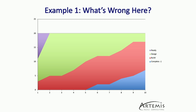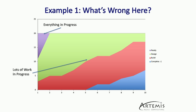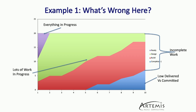Let's take an example of a cumulative flow diagram for a team that is not doing well. Everything went into progress very quickly — we have 20 items, and by day two, none of those items were still marked as ready. Everything was at some level of being worked on. By day five, we still have all 20 items at some state of being in progress. We have a lot of incomplete work at the end of the sprint — almost all of those items weren't completed. We end up with less than 50% of the items we committed to actually delivered at the end of the sprint.